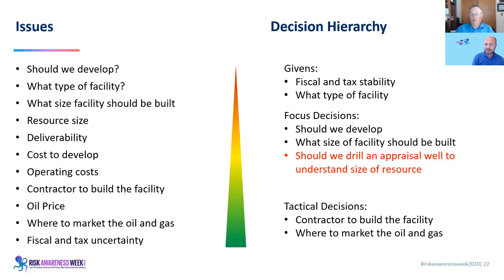Yeah, one of the problems you have with some of the subject matter experts is they feel like they have to give you a really very narrow range. And they don't feel comfortable saying, well, we need more information so I can reduce my range. Well, if reducing the range doesn't change the decision, there's no value in gathering that information, because almost always there's some cost of gathering information.